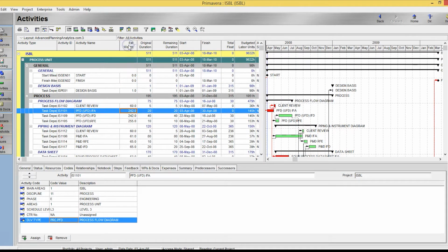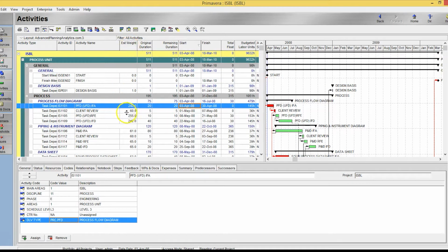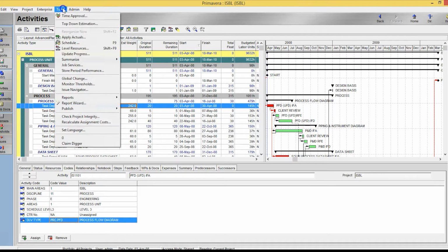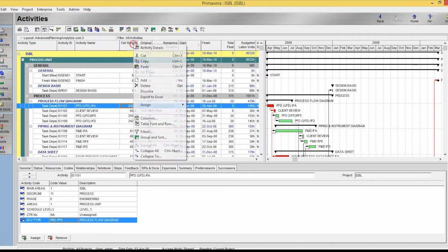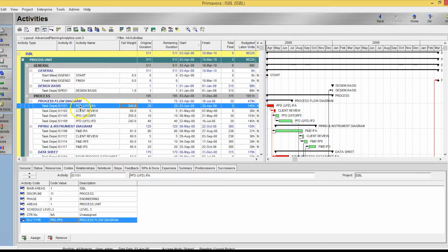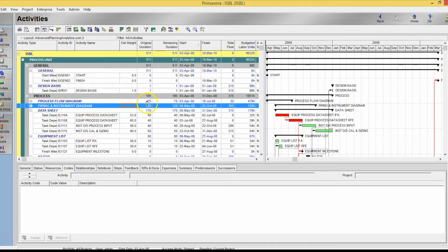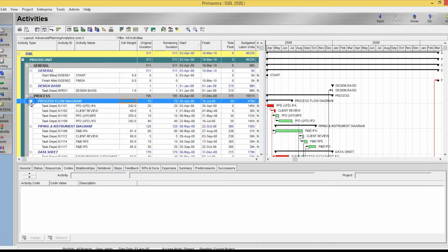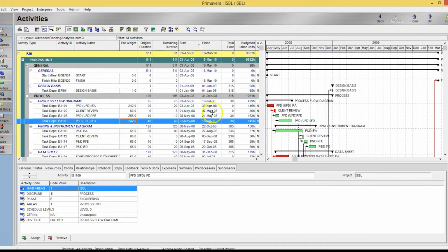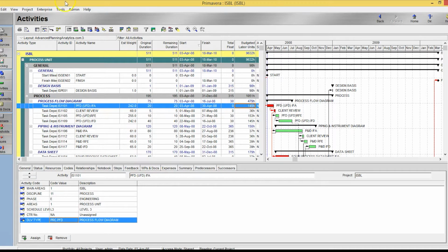So in essence, the activities are acting as a rule of credit. I added this estimated weight column here. It's out of P6, part of the top-down estimation functionality. I added it through here under General. And I added a value to it that represented the man hours associated with doing a deliverable or a set of deliverables. So I'm using them as a weight factor so that I can add man hours later when I resource load the schedule.